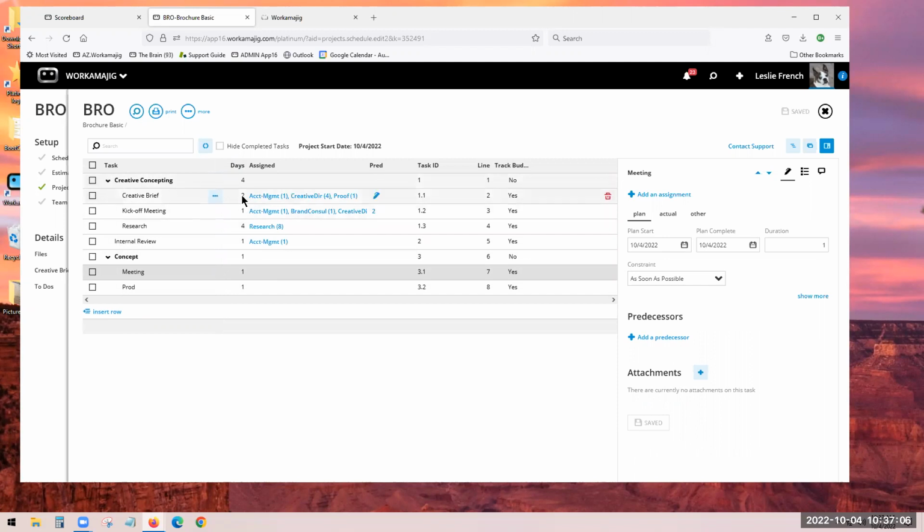We had 2 days on creative brief. If anyone's good at math, you're going to still go, what? And kickoff meeting is going to take 1 day. Research was 4 days. How in the heck does it still take 4 days? Well, it's because we haven't played with our predecessors. I guess it did an auto set with my predecessor.